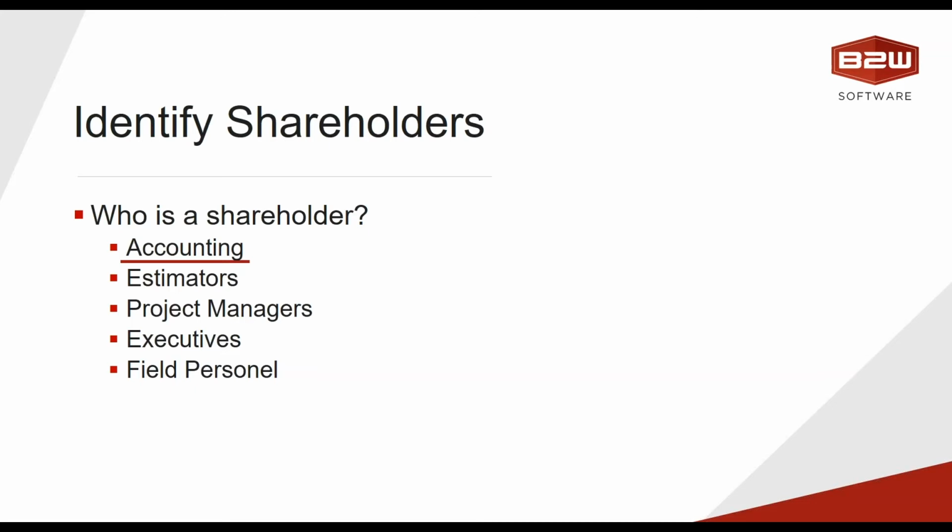But having that other perspective will oftentimes give you and your company information about, okay, what are the actual logistics of someone having to break down this information into these multiple levels? If I give somebody 60 different codes for pipe work, what does that look like for a foreman when he goes to fill out his time and the time of his crew? What does it look like for the estimator who has to decide where all these different codes go? What does it look like to a project manager who's trying to figure out how they're doing if that's broken out 60 different ways?